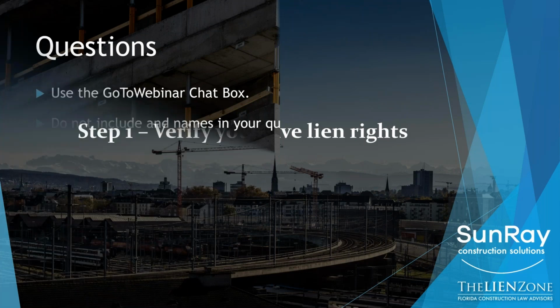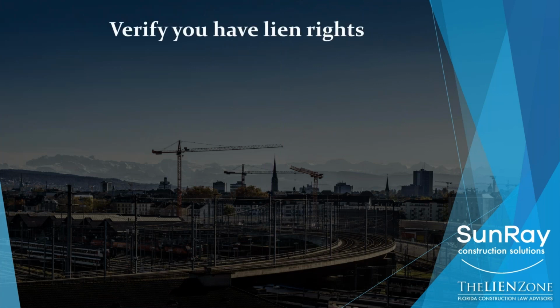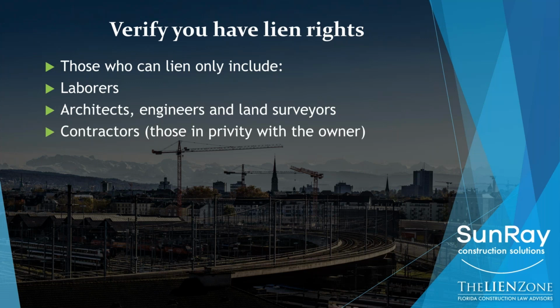So step one, how to verify that you, in fact, have lien rights. So who has lien rights and who doesn't? Laborers, that's John Smith the carpenter, have lien rights. Architects, engineers, and land surveyors that are rendering professional services, they each have lien rights. Contractors, and under the lien law, that's not a definition based on the scope of work, but it's defined based on who has a direct contract with the owner. So for example, I may be a plumber, but under the lien law, I'm considered a contractor if in this one contract I have a contract direct with the property owner. So contractors have lien rights. Subcontractors have lien rights. That's anyone that has a contract with a contractor.